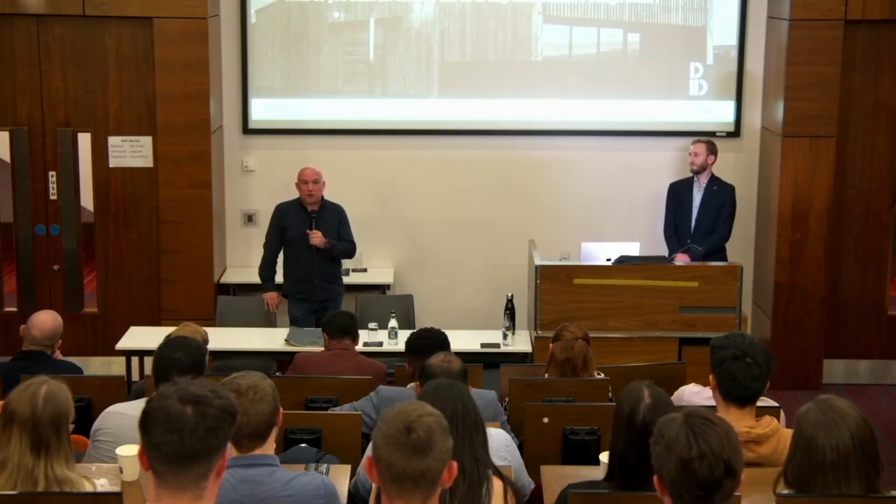The biggest stumbling block is time and getting it considered at the right time. With some of the smaller clients, sometimes we see that they won't engage with the full design team early enough in the process because they're trying to save fee or save money. I don't think that's commercially quite right. When you consider the cost of fees against the overall cost of a project, engaging much earlier and getting that expertise in earlier means that we can actually save money on a project.